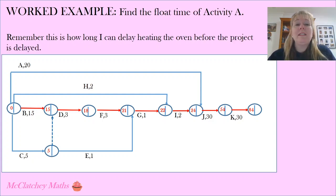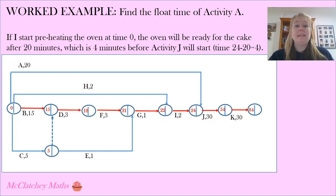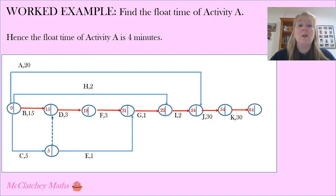The next question now is to find the float time of activity A. Remember, these are all the activities that are not on the critical path. We don't have float time on the critical path. So this is how long I can delay different activities before 84 minutes blows out. Now the first activity A is preheating my oven. So I can delay that a certain amount of time before I delay the whole project. That's a 20 minute activity. So if I start preheating that at time zero, that means the oven will be ready to put a cake inside it at 20 minutes. But that's four minutes before I actually need to put the cake in the oven because I'm not quite ready yet. So activity J starts at the 24 minute mark. That means I've got four minutes float time on activity A. So what that's effectively saying is I could delay turning the oven on for up to four minutes, anywhere up to four minutes, and I'm still going to be able to have my cake made by the 84 minute mark.